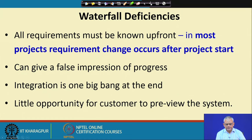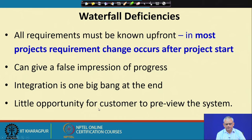Another problem is that the customer is kept out of the development. The customer defines the problem and then just waits for the software to be developed. Once the customer gets the software and uses it, they say this is not what they wanted and need many changes. One of the key problems in the waterfall model is that once the software is complete, it rarely meets the customer's requirements, because the customer is kept out of the development work.